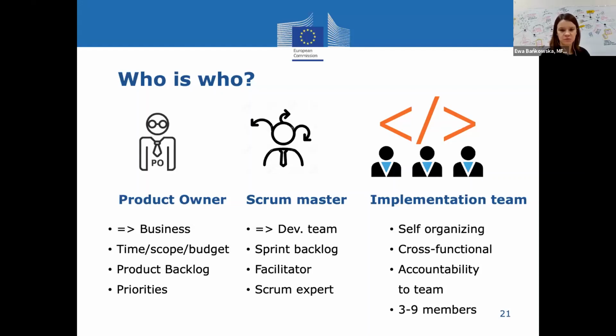That's a good question. One product owner is one team. So it's not that different product owners will have the same team. You can have different Scrum teams, which I never worked that way, but there are methodologies for really big developments. But normally one product owner is dedicated to one development team and one Scrum Master is dedicated to it.